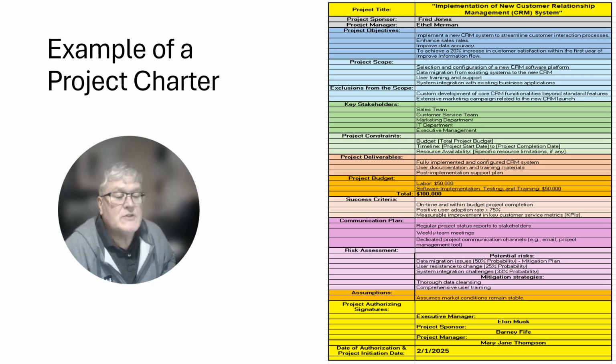There's a communication plan involved. There's risk assessments with potential risks and it even addresses the mitigation for the risks. Probabilities are stated. Assumptions are included. And also there's the project authorizing signatures and then a date of initiation for the project. So make sure you take a look at that. That might be something interesting to know and to use.